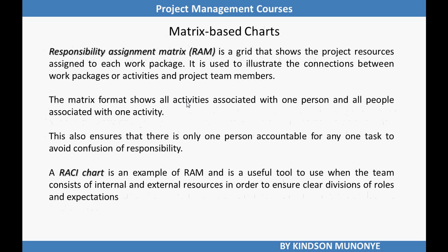It is used to illustrate the connection between work packages or activities and project team members. The matrix format shows all activities associated with one person and all people associated with one activity. This also ensures that there is only one person accountable for any one task to avoid confusion of responsibility.